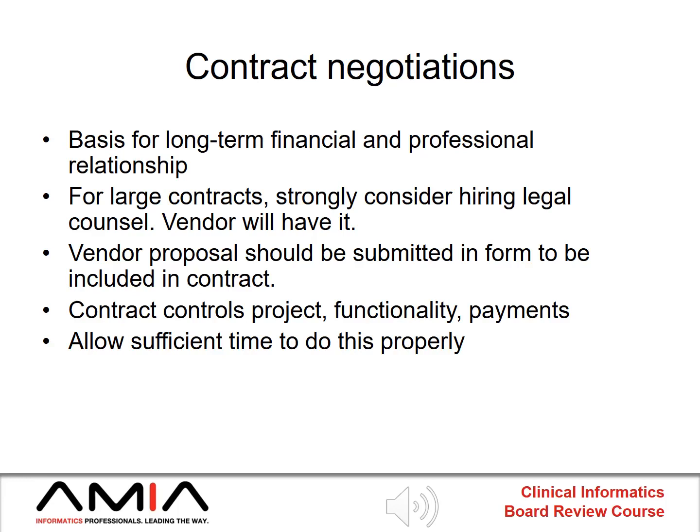The contract should control the project, the scope of the project, the functionality, the payments, and because of the importance of this contract, one is wise to leave sufficient time to carry out the contract negotiations and sign the contract with enough time to do so properly. It's not something you want to rush through.